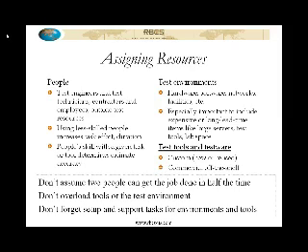Okay, so for test environments, we've got hardware, software, networking, facilities, all of this other stuff that we need to get the job done. And certainly you want to make sure that any expensive or long lead time types of items are properly assigned. It's one thing to discover that you didn't estimate the right number of pens on the project. That's probably a recoverable estimation error. If it turns out that you need a $500,000 server, yeah, that could be something you might want to think of up front. It can cause some problems later if you discover that midway through.